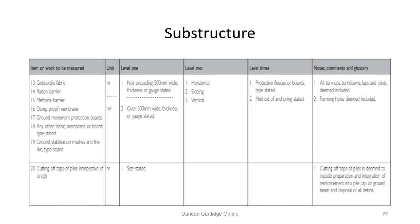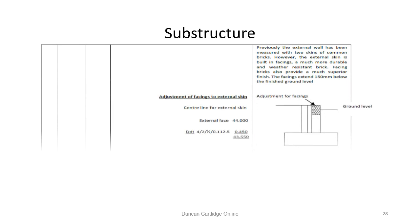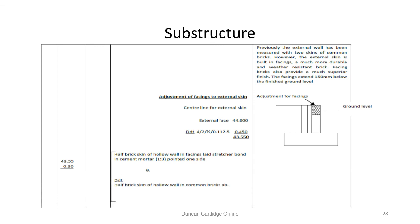Damp proof membranes are measured in section 5, excavating and filling on page 138. Also here is another example of the incorrect use of dotted lines. You will recall that we measured two skins of common brickwork on page 21. We must now adjust this to take account of the two courses of facework needed on the external face, as explained earlier.